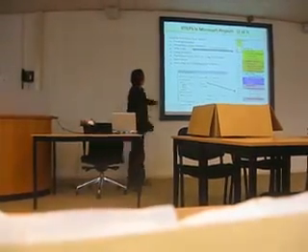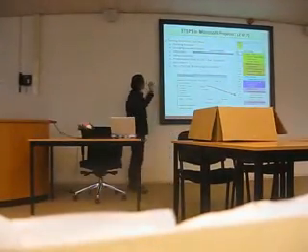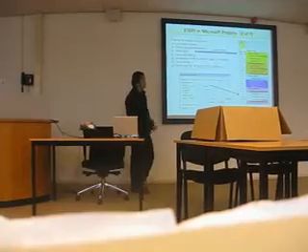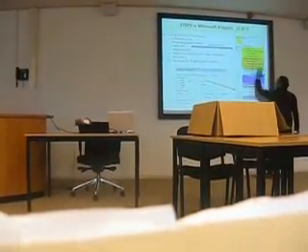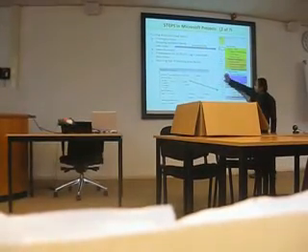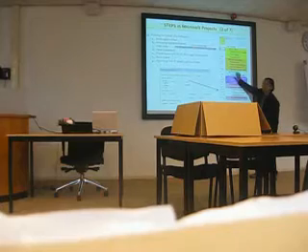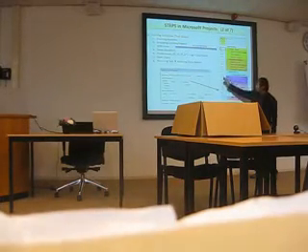Second step, entering activities. The second one, grouping. Grouping, outdent and indent, is very important like this. Grouping, outdent, indent, like this. If we group our WBS, then Microsoft Project can prepare the code automatically.